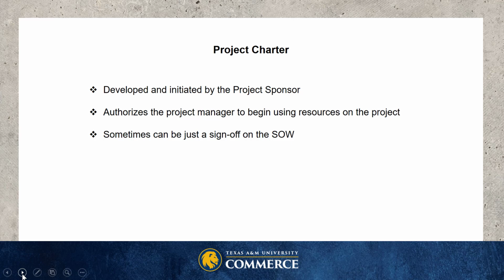Then we have the project charter, and it's developed and initiated by the project sponsor. And sometimes it can just be a sign-off on the statement of work. So that's why I said that the statement of work also authorizes a project manager to begin using resources on the project.